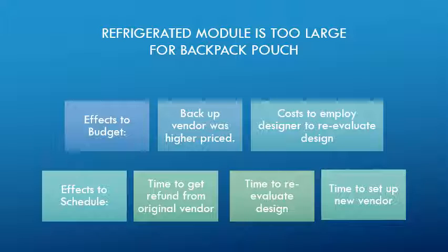Once the idea was deemed not a feasible workaround, I began the process of canceling the order with the vendor, setting up delivery for the modules to be returned to the original vendor. Because SuperPacs had a risk breakdown tool that included this potential issue, we had already determined what steps would be taken to correct the problem and get the project moving forward. Given the critical path and the time contingency created by SuperPacs, we were able to continue the project on schedule even with the time-consuming nature of the issues that arose, testing our scheduling limits.